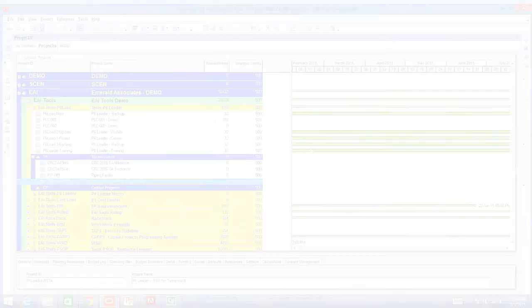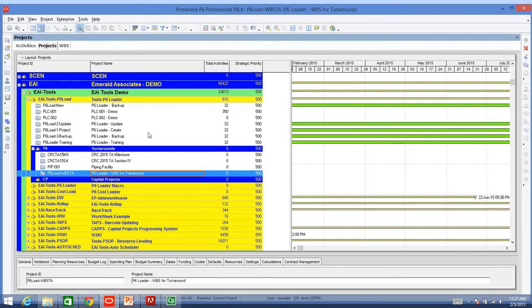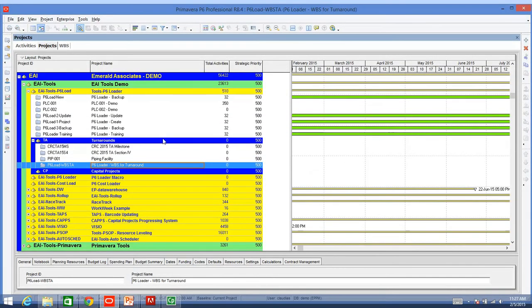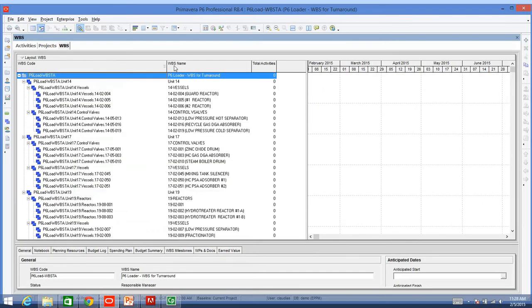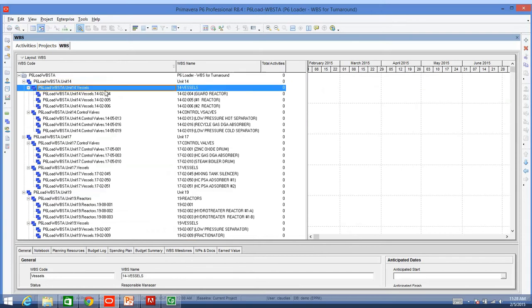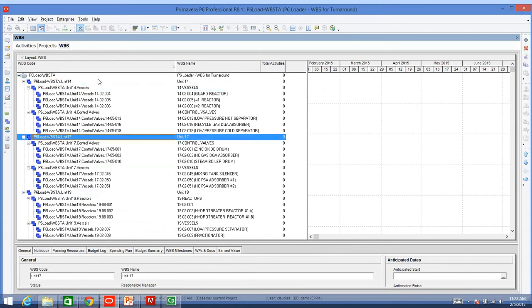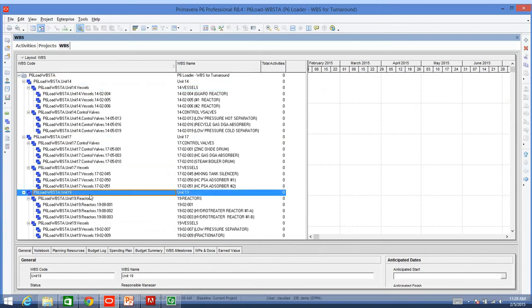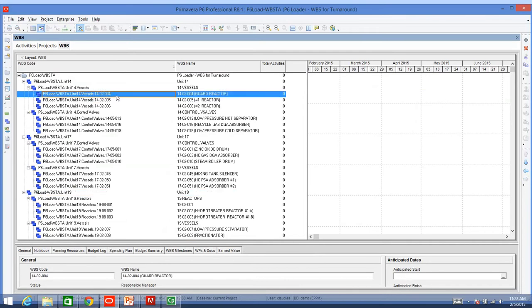I want to show you, I have my project that I have already created for the purpose of this example that is called P6 Loader WBS for turnaround projects. I have it open, and I am going to go to my WBS window. In here, you notice that I have some units, units 14, 17, and 19. I do have some service numbers underneath, and what I want to achieve is to add a new element under 1402 004, unit 14 vessels.